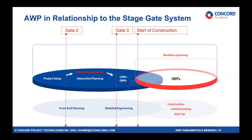Work face planning is the early version of advanced work packaging — the process of creating those small packages in the field, managing them, clearing constraints, and helping the crew and supervision have a more productive site. I've seen people combine this with the last planner system and all the good practices from lean management and lean construction, and that is fine — all of that fits into the work face planning process.